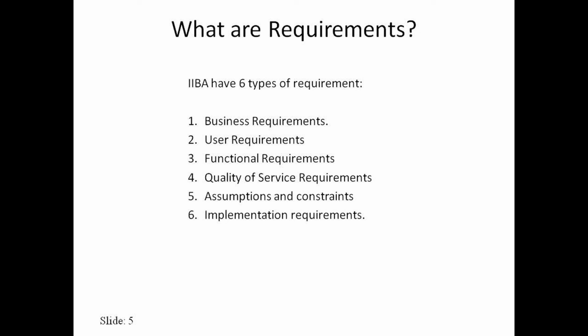And the last one, which generally we don't encourage our customers to give us, is called implementation requirement. Should we use Oracle or SQL Server, or should we use PHP or something else, Django? All these options are supposed to be decisions taken by the project team, not by the customer. But in some rare cases, the customer might say that we have a team of Oracle database administrators, we don't have any SQL Server administrators, so please develop it on Oracle itself so that we are able to manage it.